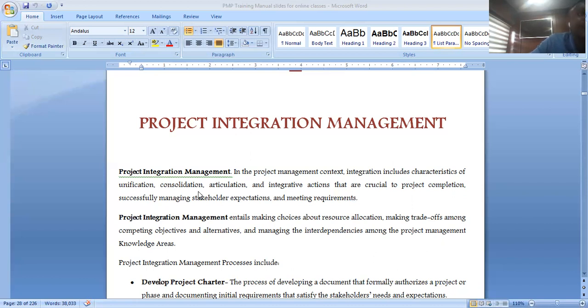The rules of engagement and also preliminary knowledge of the budget, the speculated time, the required quality at a high level. But the project charter is also saying that this is not everything about the project. We know that the budget can be changed. So take this authority, go on and start planning it. You see? Start planning it, so you come up with a tentative budget, tentative schedule, and everything about the project. That is what the project charter is saying.